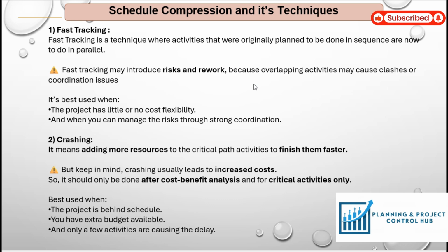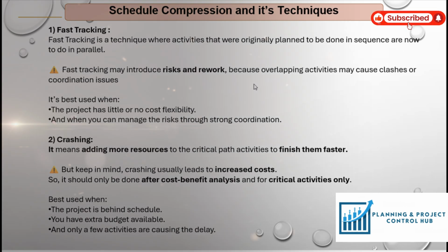The fast tracking technique may introduce risk and rework because overlapping activities may cause clashing and coordination issues. It's best used when the project has little or no cost flexibility and where you can manage the risk through strong coordination.